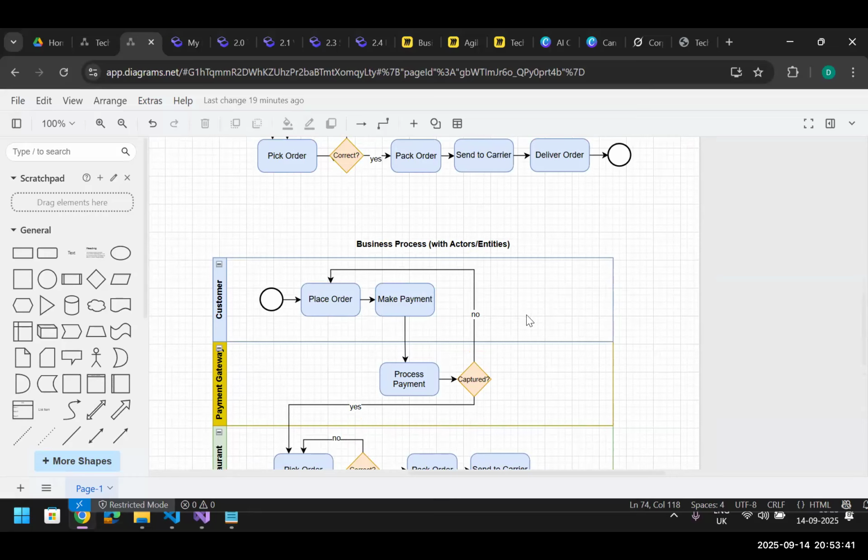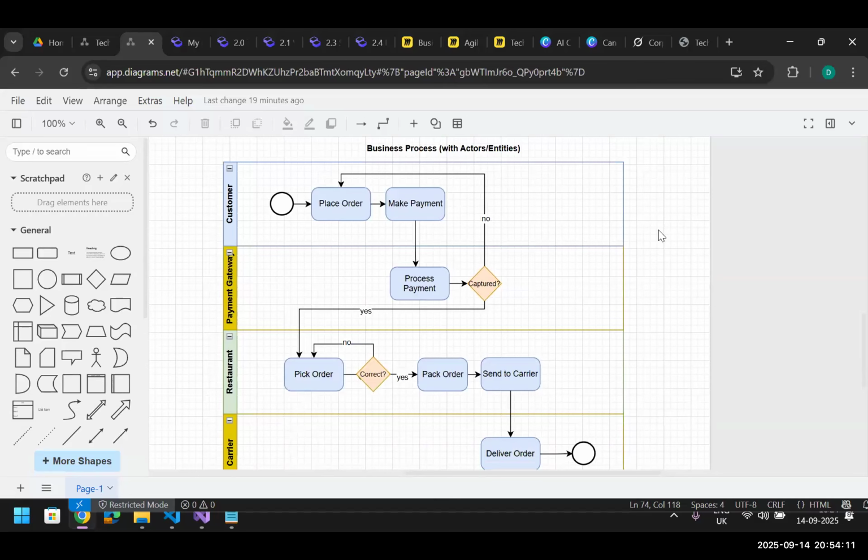This helps me now to create the scope of the project. Scope means the features that I'm going to deliver to my client. Based on that we can calculate the cost, time, and how quickly we can deliver this. Is it a mobile application or a web application? What is the backend? Data tables and everything come into the picture, along with a high level design. Next, I told them I'm going to come up with two things. One is scope, in Excel. Scope is what I'm committing to deliver to him as a technical partner.